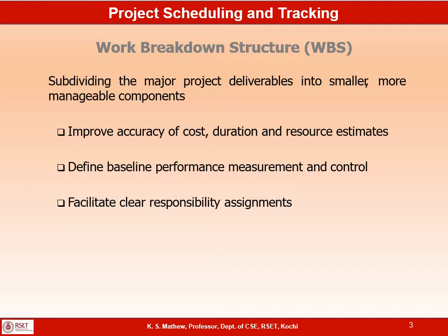On the top root node you have the project, the entire project as the major deliverable, which can be further divided into main sub-deliverables. Under each main sub-deliverable you can have further sub-deliverables and components. So you will get a tree structure that is called WBS. What is the purpose of dividing a major deliverable into small, more manageable components? It will improve the accuracy of cost estimation, duration estimation, and resource estimates, and it helps in defining baselines for performance measurement and control.